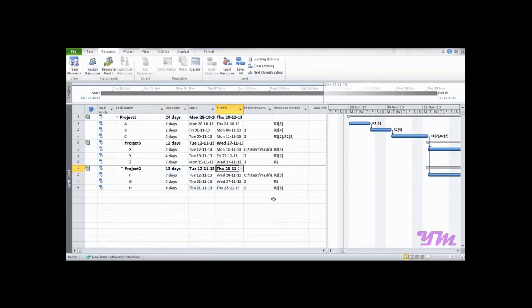So now the resources are again being connected with this file too. Now we have connected the 3 files of projects with 1 file of resource and finally clubbed all of them into one single file. So now making change in any one of the files will also make the changes in all the files.